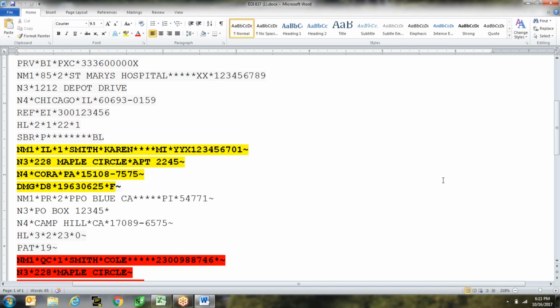Any project, when you are upgrading system from one version to another, you always prepare a gap analysis document. That means in one column you document what the current state looks like. In the second column you will state what the future state looks like. The third column will say this is the exact difference. A minus B is the C. This is the difference. The difference is the scope of your project. The difference is something you have to implement in your system to be in compliance with the government. If you don't implement that change, you cannot do business in America as a healthcare entity.